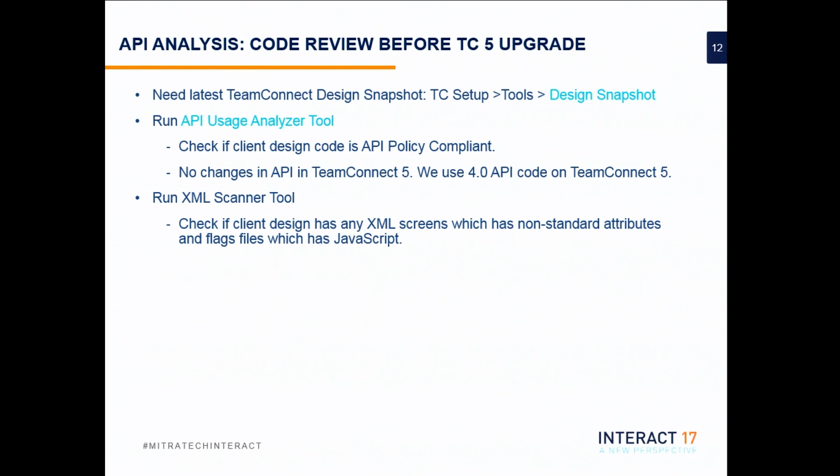So you remediate all that before you actually keep going forward? You can do it in parallel. We just have to make sure that before you go to QA testing or UAT testing, that non-compliant code is fixed so that your business is testing with the compliant code.